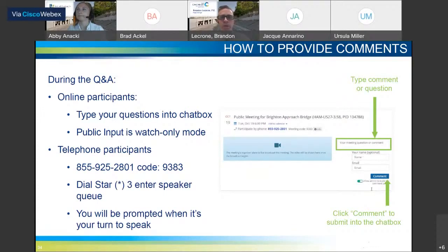Yeah, thanks for the question. So we don't really anticipate that the Western Hills Viaduct project will impact the Brighton Bridge, both in terms of just the timing of the construction and the finished products of each. The construction schedule for Brighton has us complete in 2024. I believe at present, the timeline for Western Hills Viaduct has it starting at the earliest in 2024, but that would be items probably not near this area.